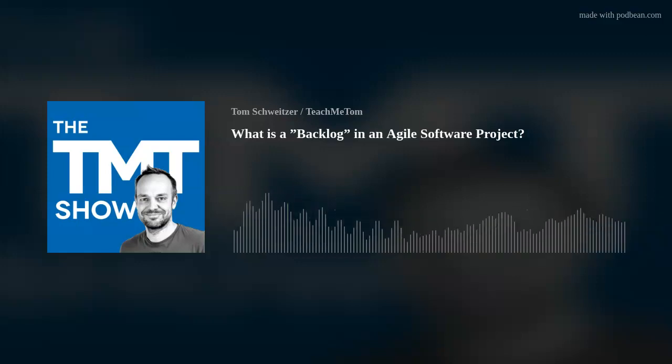Every 1, 2, or 3 weeks, so let's say every 2 weeks, we're going to have a planning session, meaning we take a look at the product backlog, at the user stories, at the functionality that's written in these user stories, and we start from the top because these are the most important ones.